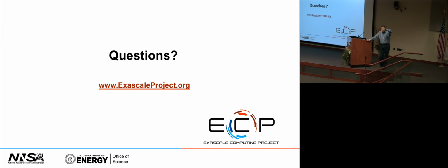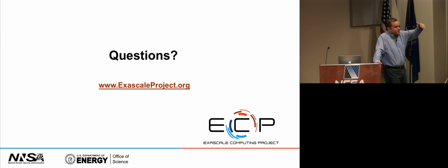The other risk is not knowing what the actual system is going to be. That gets decided so late that, in Japan, for example, they already know their one system, and so they can build the software for that. Here we have to build software for any possible system, and even any number of applications. The number of applications is also quite large, and if it grows, then there will be more applications to support. So the risk is the space is too large.